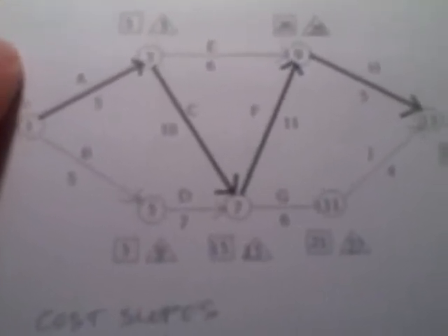And so once we have the cost slope, we can reduce activity F by 1 day. If we do that, we can see that activity F becomes 10 days and the project will become 30 days, which is crashing it by 1 day. As I repeatedly said to you, to do it 2 days, you have to do it 1 day at a time because you have to reschedule. And you'll have to redraw this diagram. I didn't do it here.